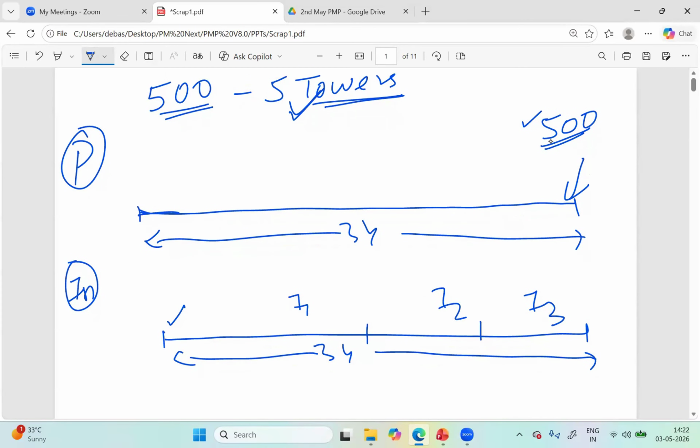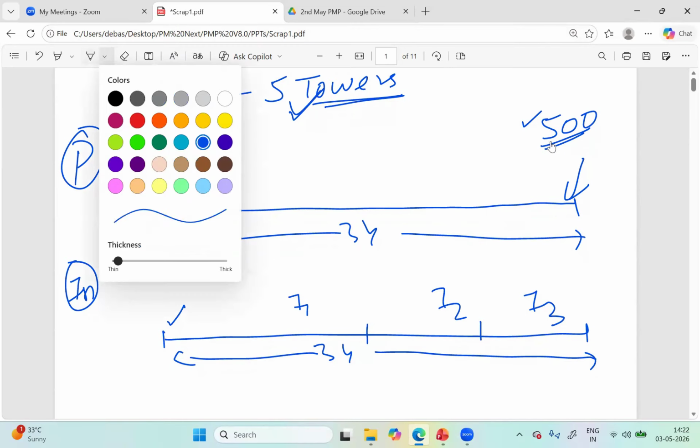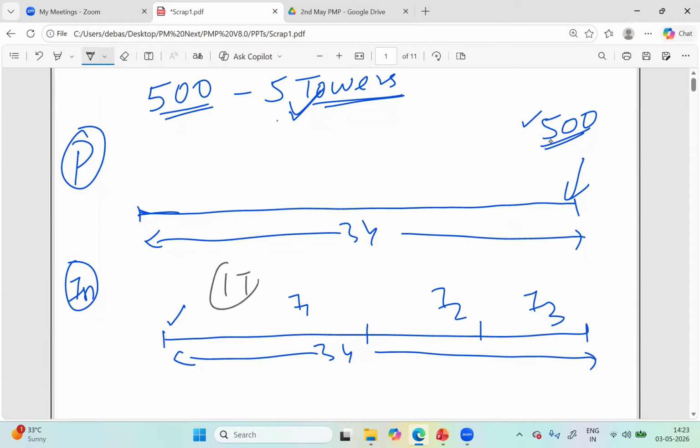Watch, I don't work on all 5 towers in iteration 1. What we do in iteration 1, we pick up 1 tower and work on it. Only 1 tower, right? Not all the 5. And we complete this 1 tower. We get to the interiors. We're also working on other amenities. And watch, by the end of iteration 1, say iteration 1 is 1.5 years from start, imagine all my 100 apartments are ready. 100 apartments are ready to be delivered to the user. We'll deliver it, release it.